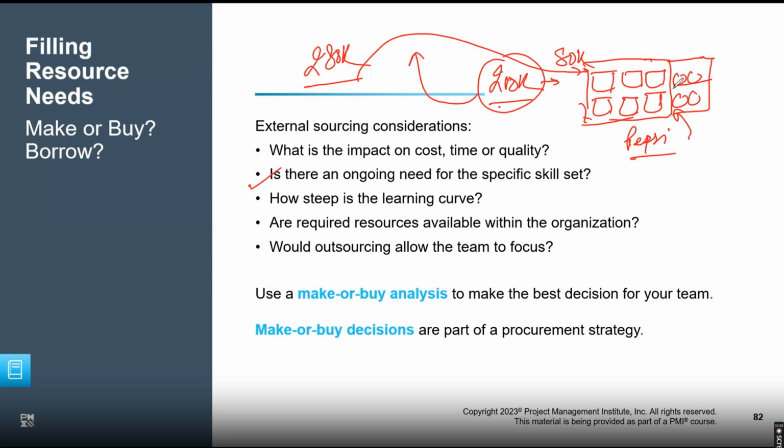Then I will have these 4 extra machines or 2 extra machines, which I will keep as standby. If the market demand increases, I will be able to catch up and cover up. So the bottling problem will not happen. But then there will be leaner months when it goes down to 150K. More than half of my machines will be unused. So it doesn't make logical sense to do this job, because I am not into that area. The companies which are doing bottling, they're doing bottling for everyone.